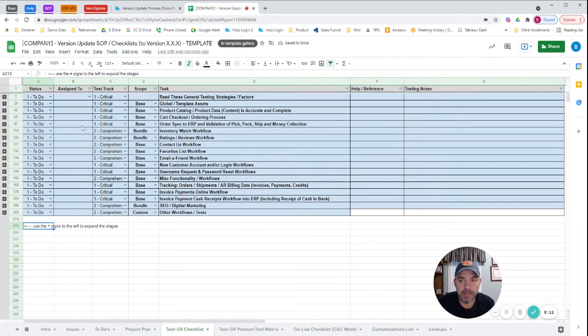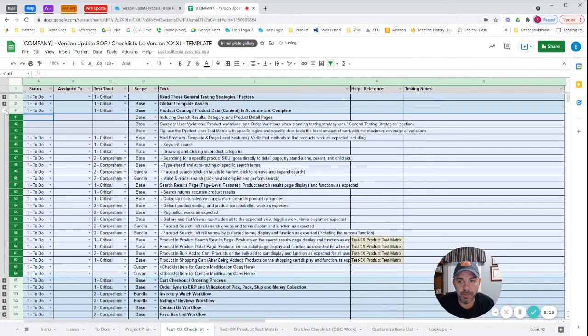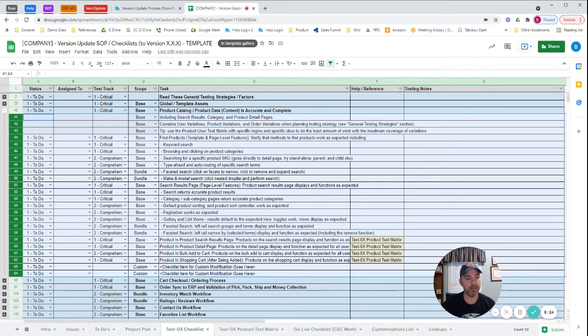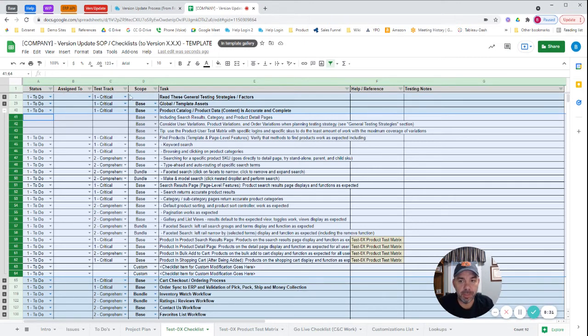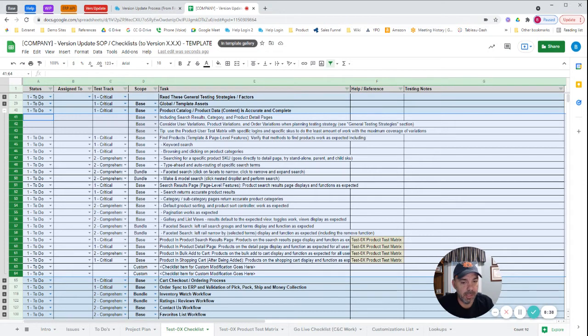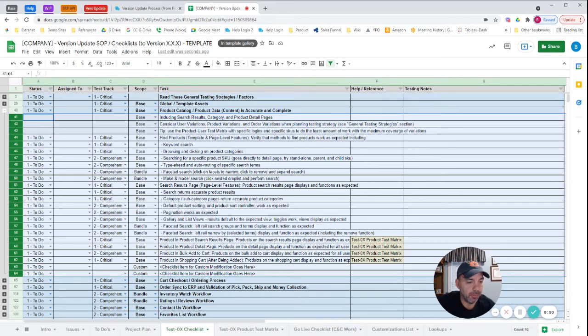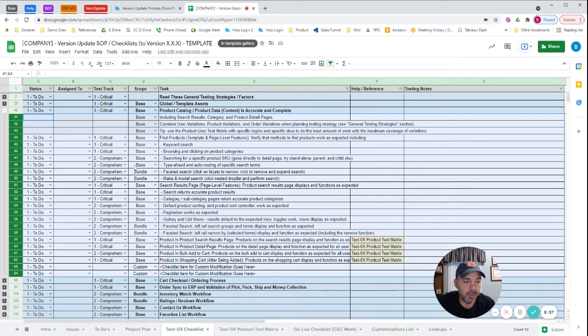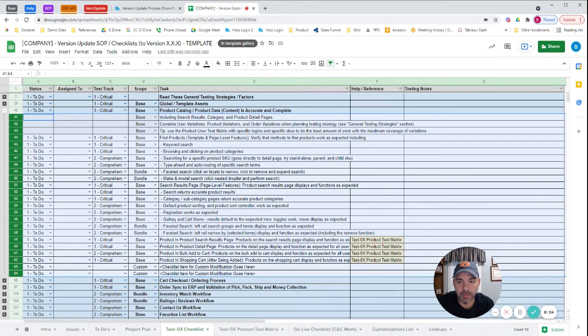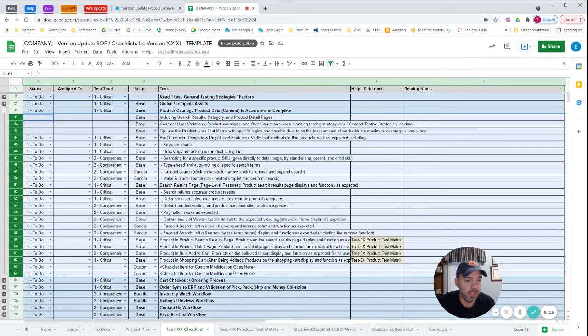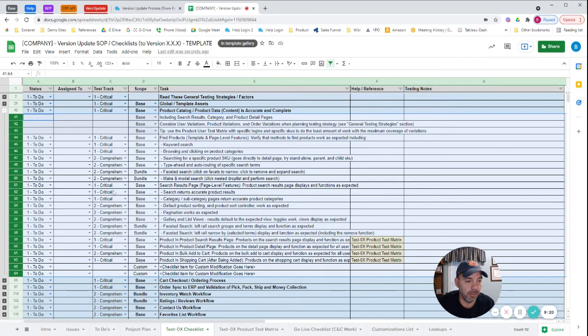We have a default testing checklist. You can expand these. The concept behind the testing checklist is you can add tasks anywhere that you want. And what we recommend is the lead operator and the project manager keep and expand and mature a thorough testing checklist. We recommend having two test tracks, a critical and a comprehensive. The critical test path is basically a shorter test run that's getting the core things, typically things related to product pricing and ordering and validating that those work as you're going through stage one and the optional stage two dry runs in the checklist. If you have a larger version update or a more critical change, if you're using this for a project publish with significant project work that you're using a project sandbox for, then it's recommended to do the comprehensive. But that's really a risk versus trade-off thing, and that's a business decision that could be made by the program manager, the project manager, and the lead operator.